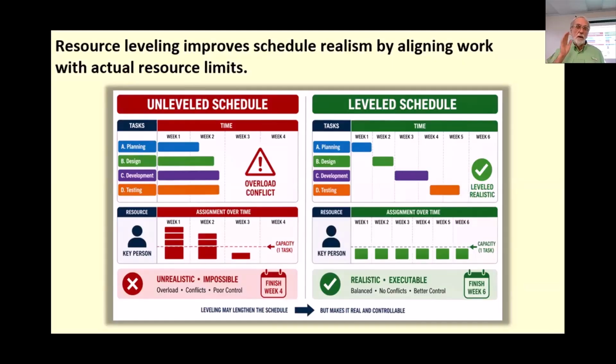And what I've seen, especially in software, we used to do these kind of big lead ups to releasing the product, where people were working these crazy hours, and then all of a sudden the team would just disappear for a month. They'd been holding up all their paid time off, and now the release is done, and you have nobody around to plan for the next release. You have nobody around to help with any kind of rework or warranty issues. So you get these peaks and valleys, and what you want is a good, sustainable, common pace. And resource leveling helps you do that.